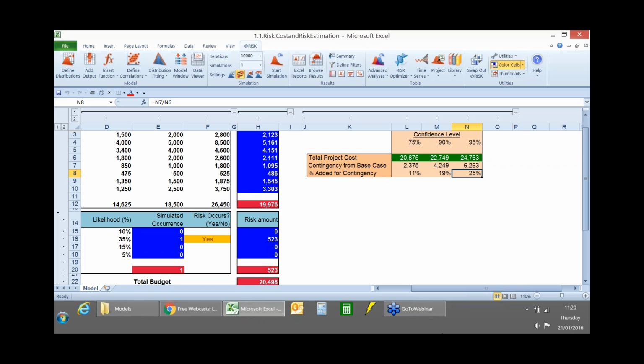Now, something else which some people do as well is that sometimes, and I apologise to any project managers amongst you, project managers aren't trusted. If you add on contingency for risk, then it's going to mysteriously disappear within the project budget because costs escalate and they're not controlled in the same way. And so sometimes the decision is that the project manager is given the P75 or the P80 or whatever it is, and that's their project budget.